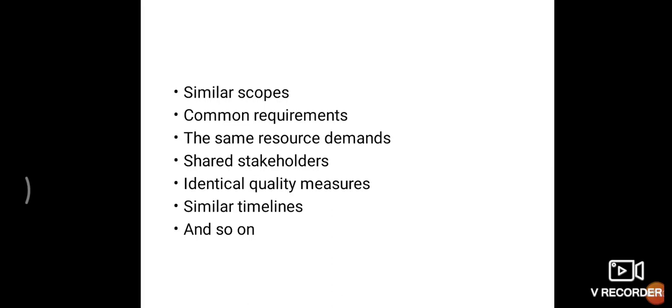So the testing department is a common resource. The projects assigned in the different departments have to be tested by a single testing department, so there can be an overload of requirements and resources for that department. To minimize this kind of problem, proper documentation and planning for the software projects has to be done in the portfolio project management itself.